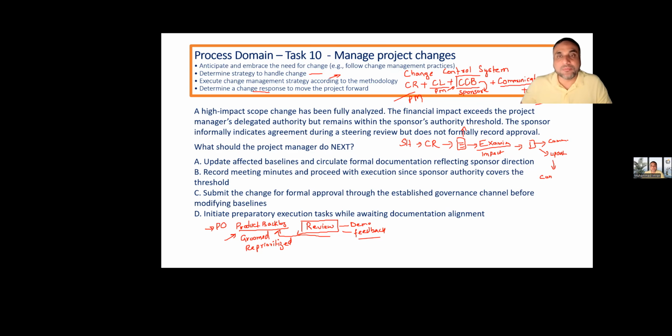And after updating the baseline, they will work with the new version of the baseline. So in the configuration management system, you will record that, okay, this is version 1.1 or 1.2 and so on. So this is the sequence of predictive one.